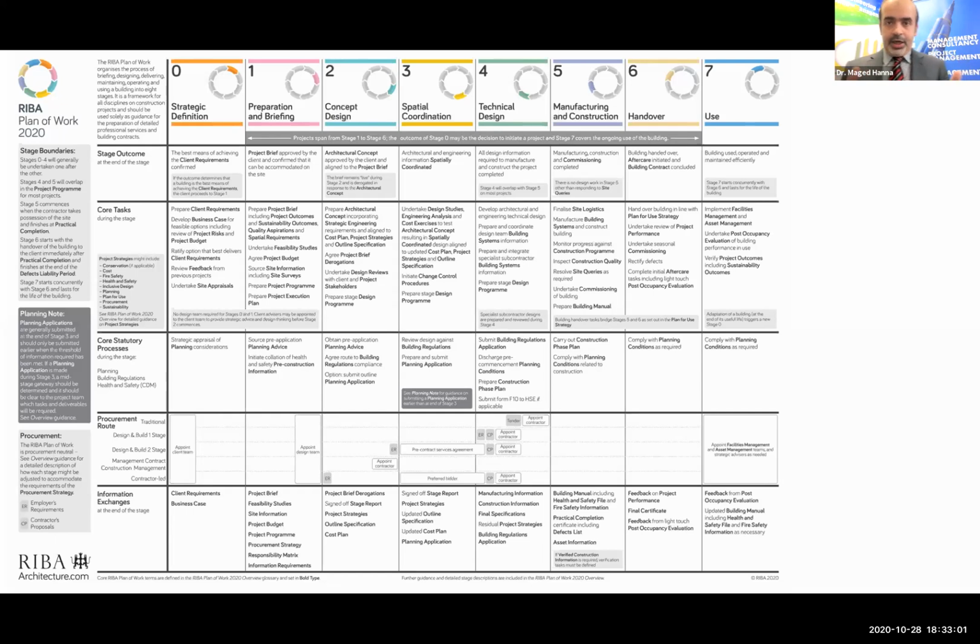And that is, again, a longer stage. Sometimes, when we are not managing the design phase, we can find some projects where the design phase takes maybe 1 year or 1 year and a half until all parties and all stakeholders agree. And then they ask the contractor in the execution to finish in 6 months. I think now you understand where the issue is. We spent a long time over the design, and when we reach execution and construction, we are asking for acceleration. From here, we can find a lot of errors and a lot of risk triggers over the project that can cause it not to be successful.